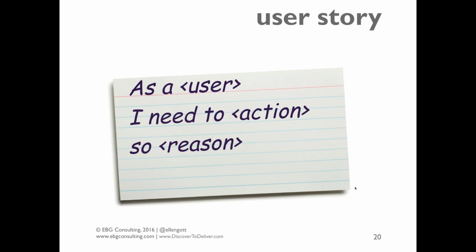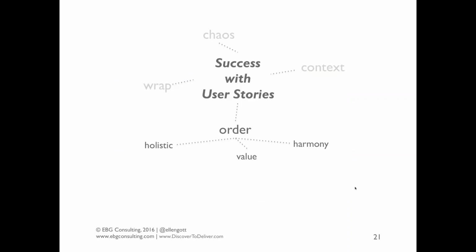The point is they're going to be evolved and refined as you progressively do your planning, and very importantly for your product people out there and the team, once you've assessed this item in your backlog to be valuable, once you get down to the now view, when it really is a requirement, it has to be ready. It has to be actionable, testable, and really consumable by the development team. So that's a little bit of context.